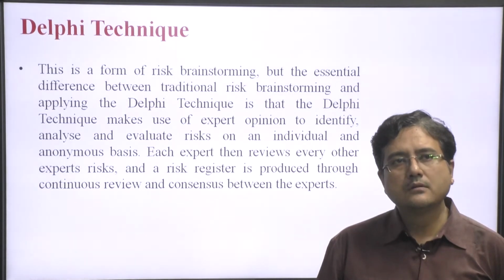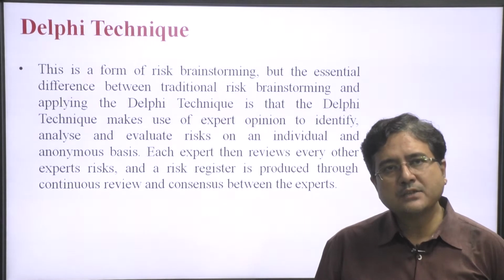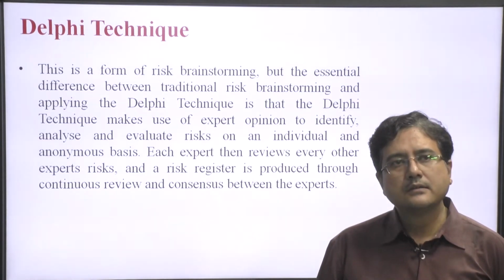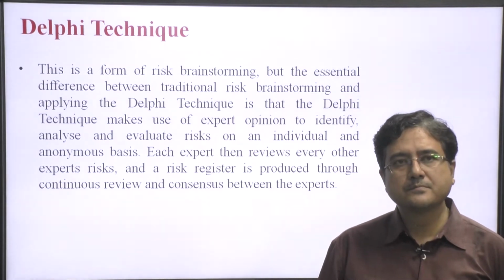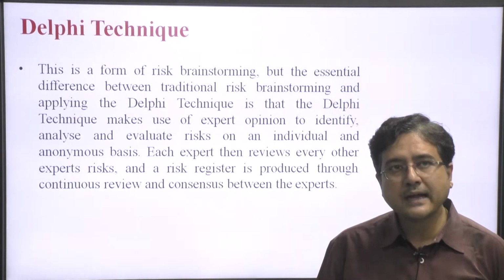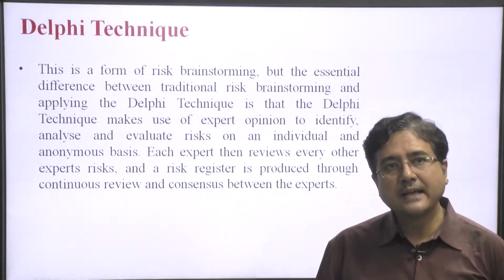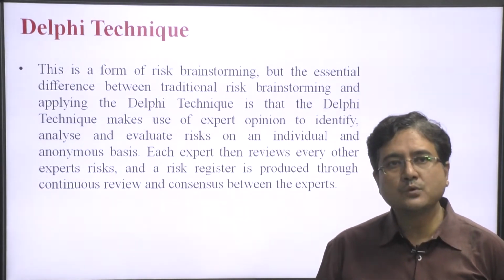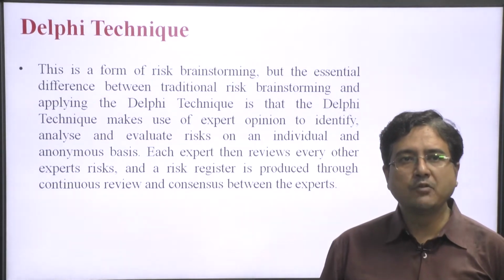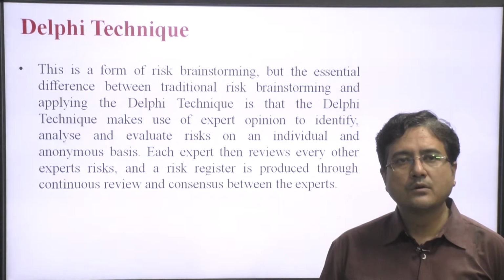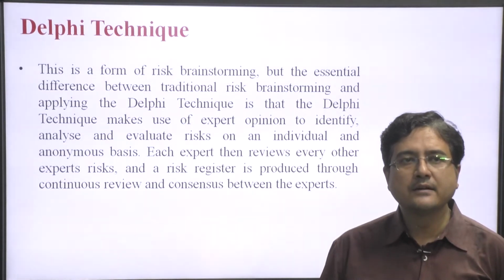It is a form of risk brainstorming, but the essential difference between traditional risk brainstorming and the Delphi Technique is that the Delphi Technique makes use of expert opinion to identify, analyze and evaluate risk on an individual and autonomous basis.